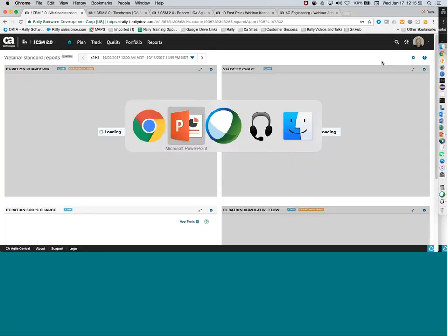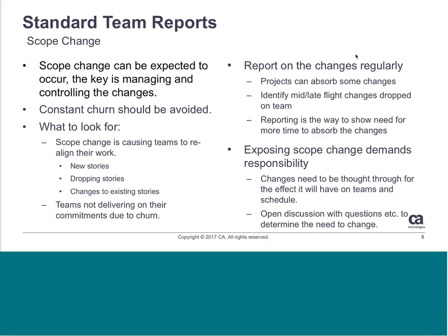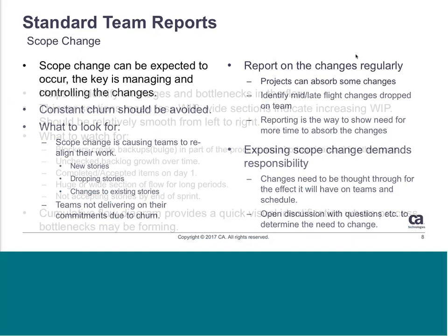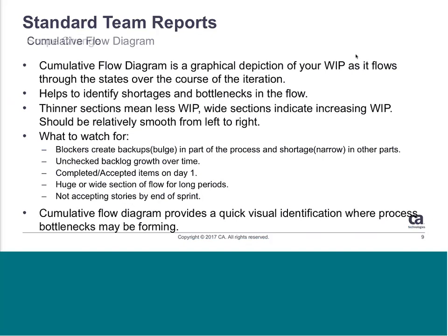You may see 0 time periods. That's an indication that things are just jumping through the process quickly. They're not actually spending any time in that particular state. It may have jumped from the initial state to somewhere in the middle. So I want to understand why that's happening, and is something going on with that particular process? Is it maybe an additional state that doesn't provide any value?